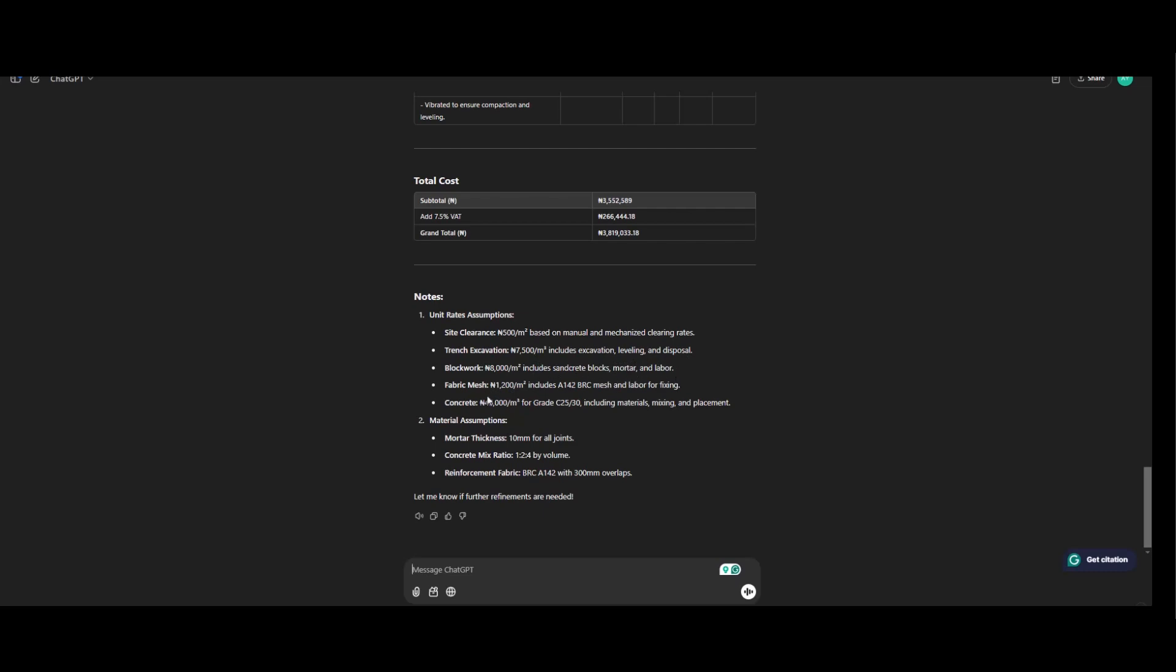Fabric mesh. 1,200 per meter square. Concrete. 45,000 per meter cube. Material assumption. Mortar thickness. 10 mm for all joints. Concrete mix ratio by volume. Reinforcement.